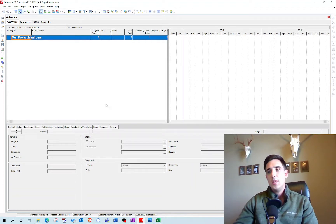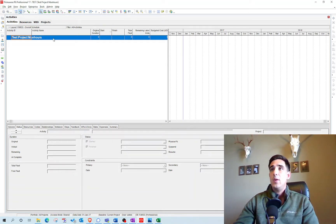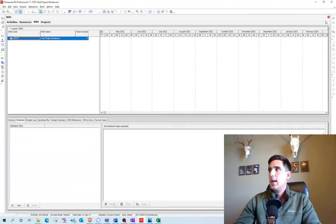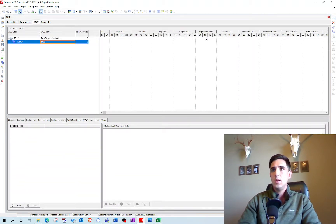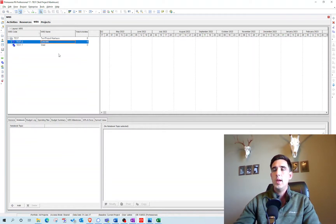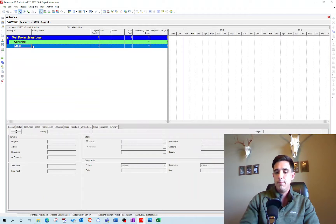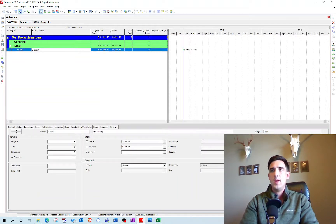The first thing I need to do is create a template file from P6 with the relevant information needed for the import. I have this test file that I'm going to bring all this information into. I'm going to create a WBS — one for steel and one for the concrete subcontractor. The next thing I'm going to do is create an activity and put it under the steel WBS, calling it the export activity.